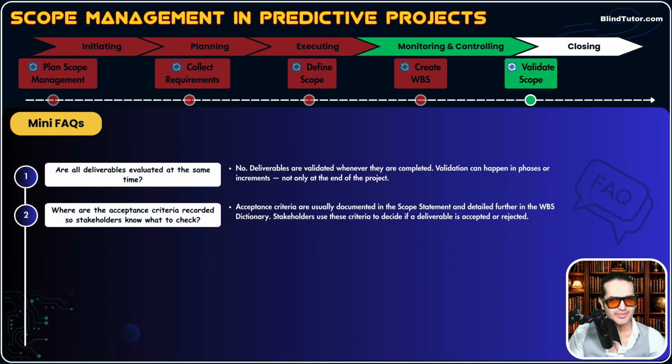Okay? And remember, guys, very high level acceptance criteria for very high level deliverables, those initial things are mentioned in the project charter. So if in a question you don't see scope baseline as an option, okay, choose project charter because it involves high level acceptance criteria and deliverables.